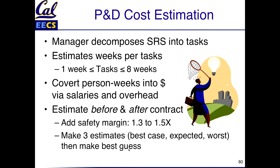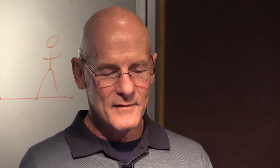One idea is to add a safety margin — you and your team work through how many weeks tasks will take and multiply by a factor like 1.3 or 1.5. Another idea is to make three estimates: best case, expected case, and worst case. After looking at all those estimates, you make your best guess. That's the cost model.